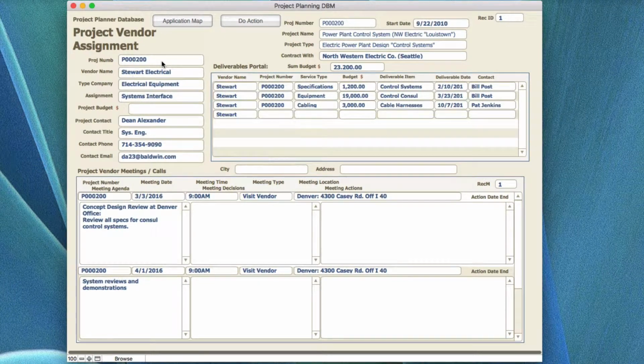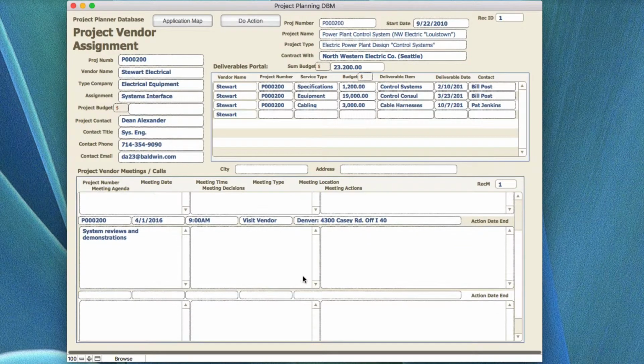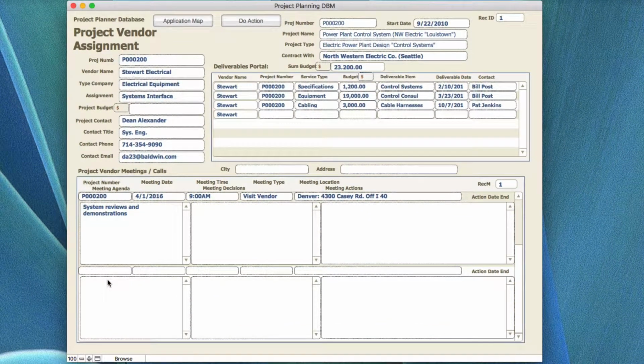So when you start adding the record for a new one here, that information is going to be based on that project. Let's talk about selection. If you're going to have some items that are going to be added together for a vendor, you would hold vendor meetings for making a decision if that's the company that you want to go with for this project. You can have them receive an RFP, a request for proposal, that you can send them, and they can provide information, and then you can document that information down here. You may have an initial meeting with them, maybe a follow-up meeting, and then as you scroll through you can add additional information about the vendor themselves and the issues you may have either with their RFP or whatever. You can keep on covering that information.